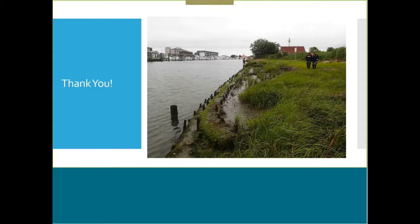I guess we can start off with the time of year restriction as it relates to the regional conditions. Obviously, it's March 1 to June 30th in-water work is the time of year restriction, but if you are working at low tide, technically there wouldn't be in-water work, so it wouldn't be an issue. Just think about that and include that in your application if that's the case. Otherwise, if you do plan on working within that time of year restriction in the water, then we'd have to do some sort of coordination with National Marine Fisheries Service, probably some sort of expedited, informal consultation for EFH.